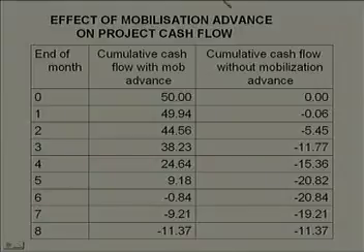So, it is very clear at the end of month 0 itself. If you have received the mobilization advance, it gets reflected here. You can find 50 written over here. That means, as a contractor you have received rupees 50 lakhs. All these values are in lakhs. Yesterday I had explained that 1 lakh is 100,000.